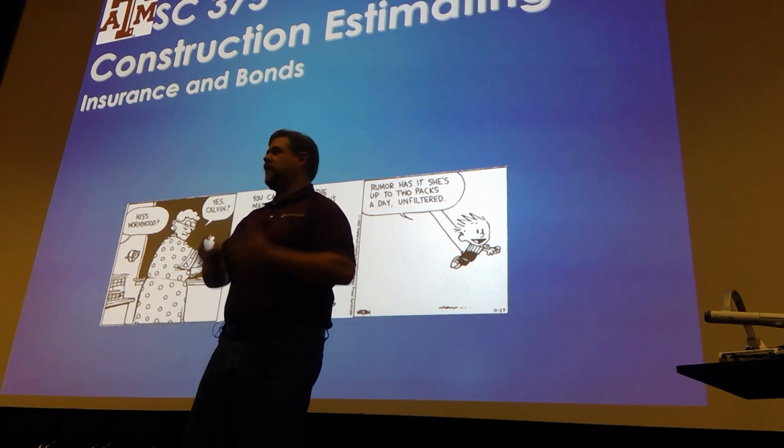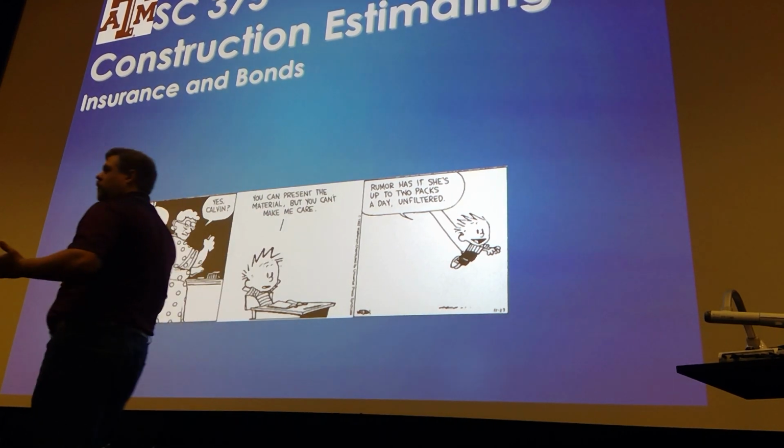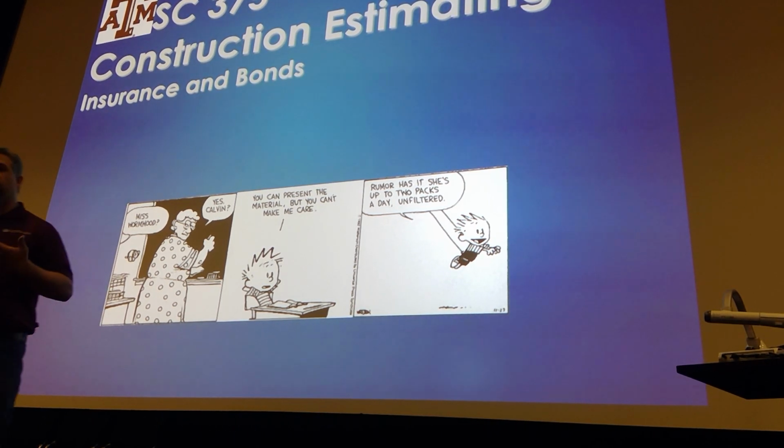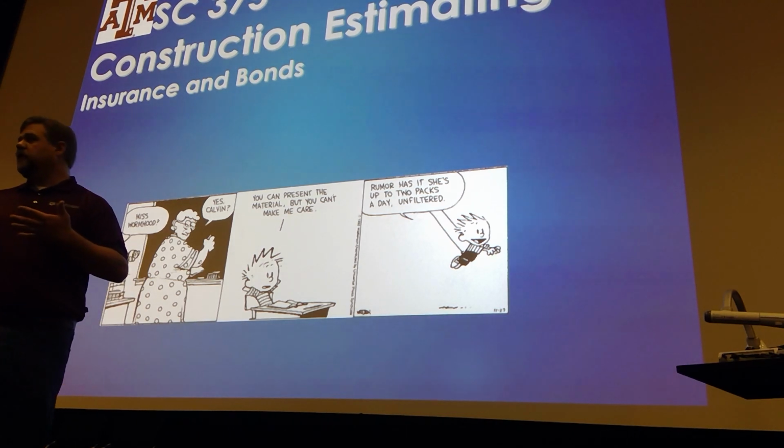I've done the checklist portion of it. You're not being given a scope of work. What you're being given is a completed checklist with 15 items on it and spaces for 3 subs. You just need to check for those checklist items on those subcontractors and add money or subtract money as necessary to make a good decision. Okay? I think developing the checklist is the part of the bid tab that scares you guys the most. That part's been done. All I'm asking you to do is to interpret correctly the proposals.